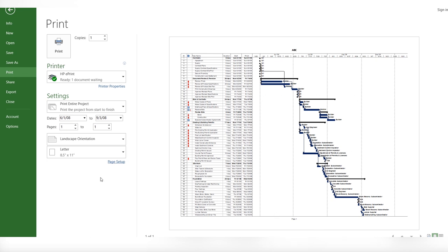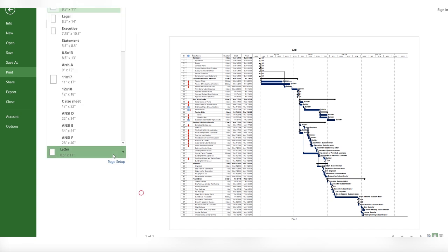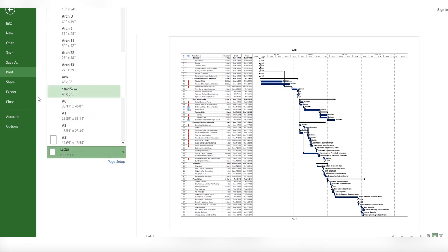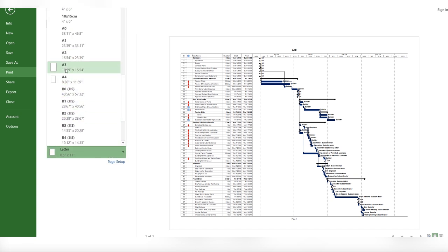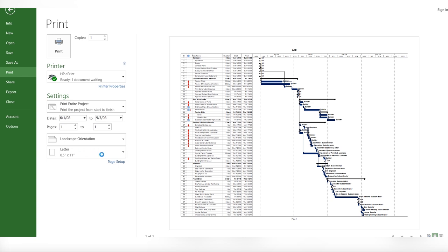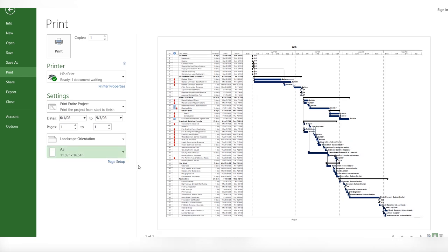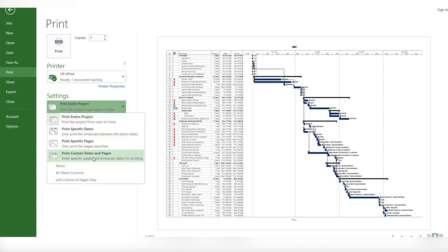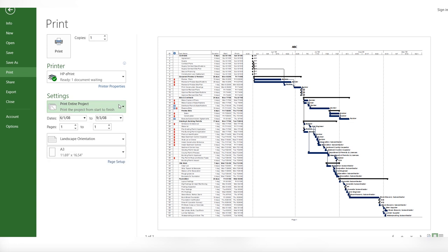And you can change the page size from letter to whatever required, A3, and you will see. From the dates you can change the starting dates as well, and you can also change the specific date pages. There are a lot more options you can explore.